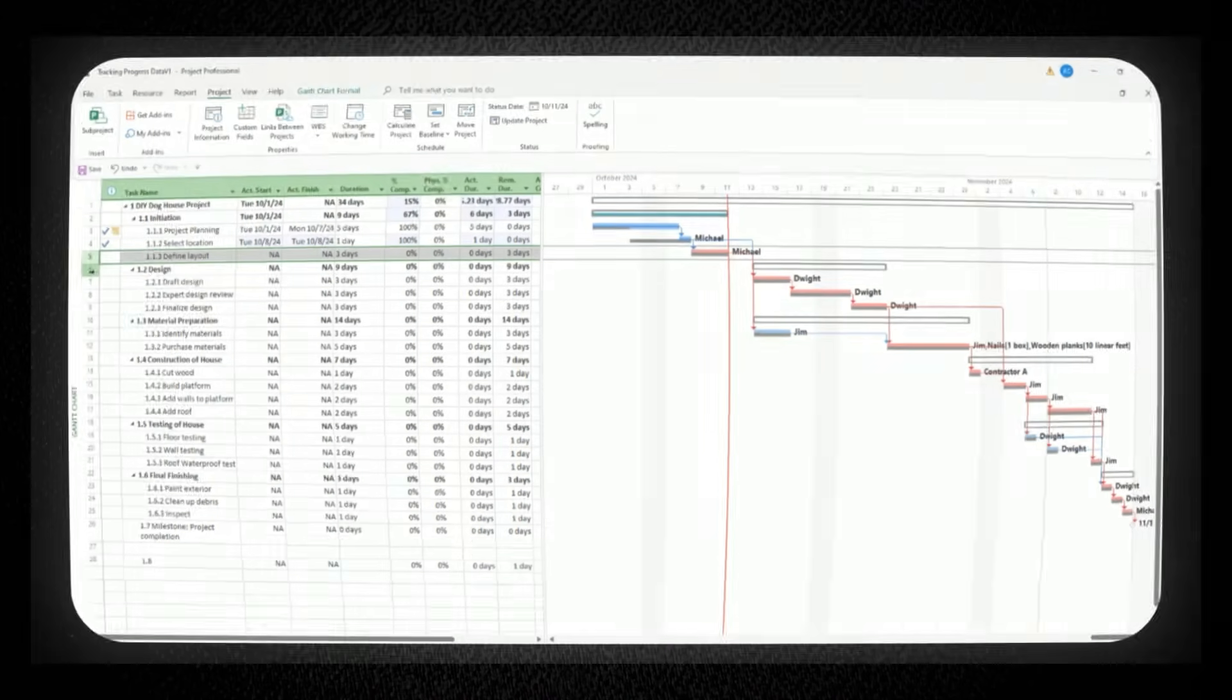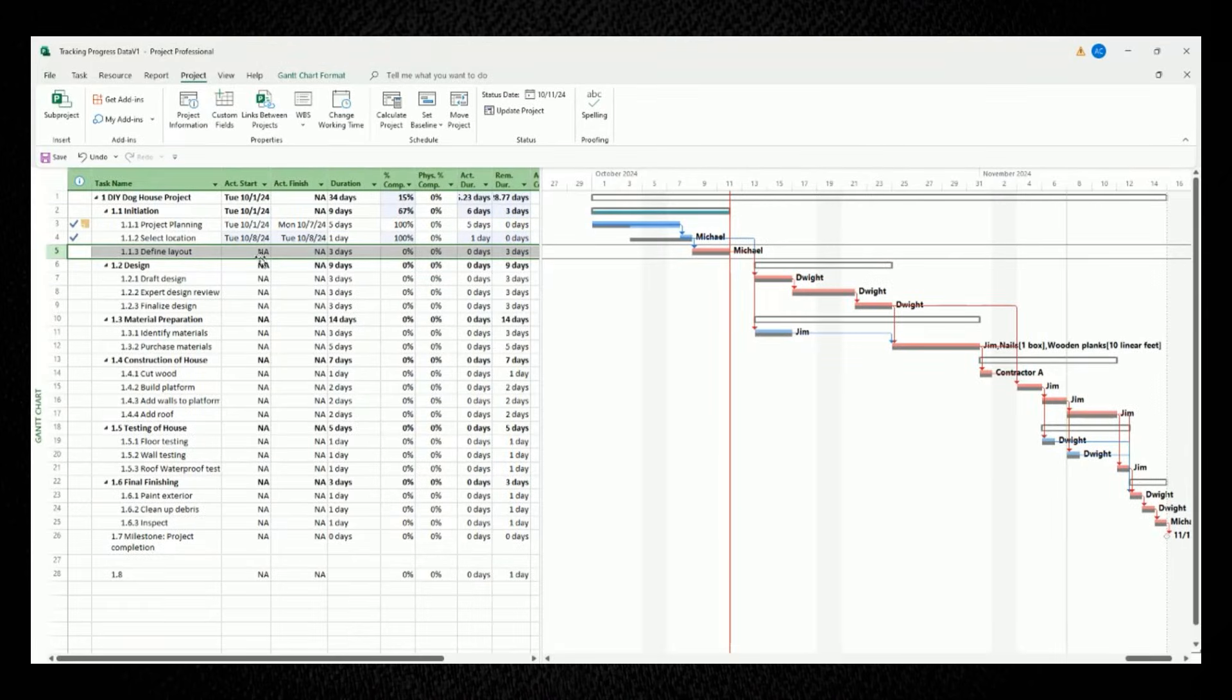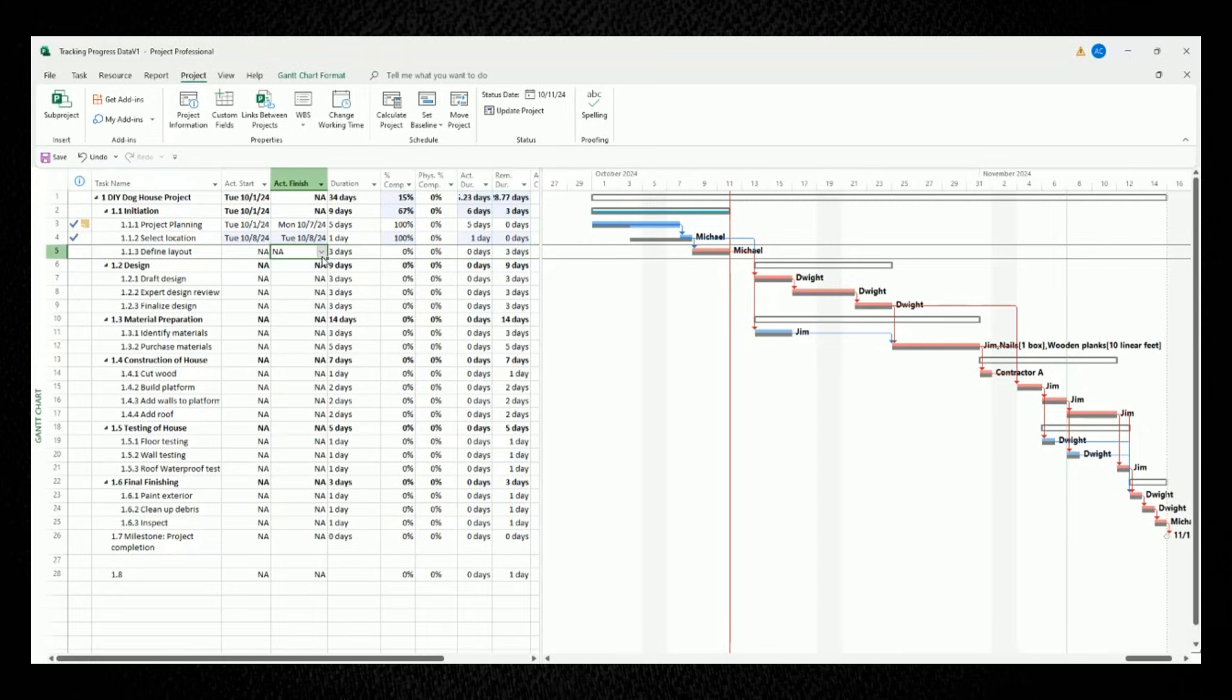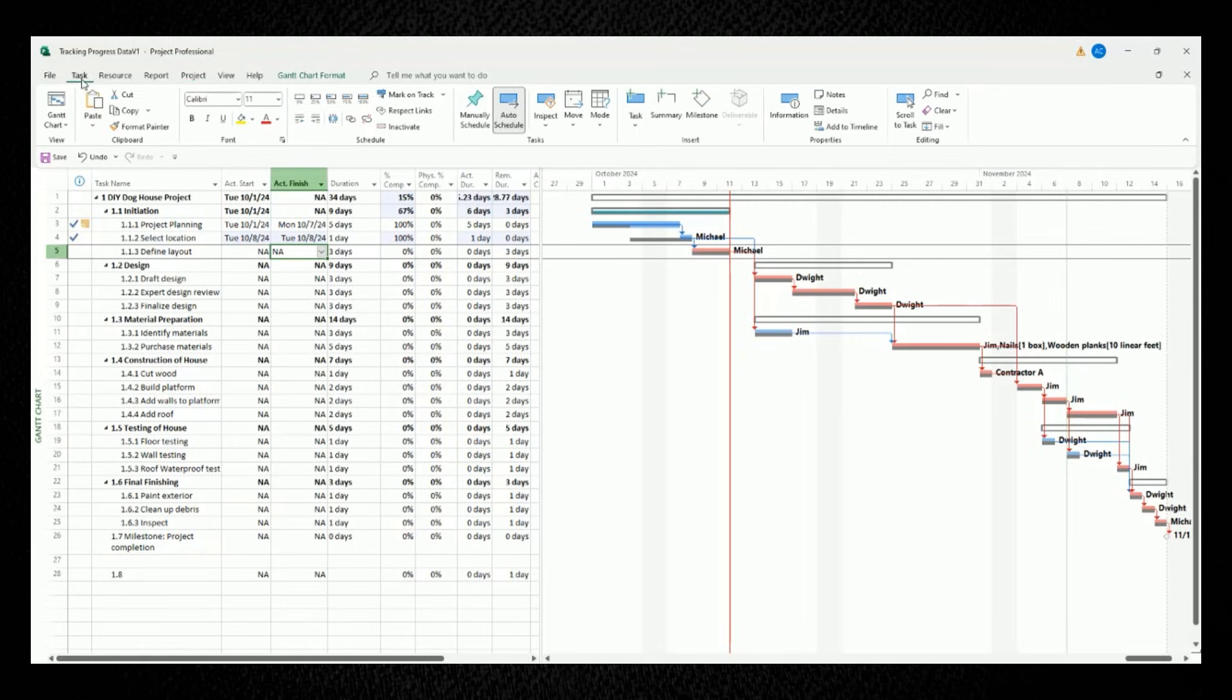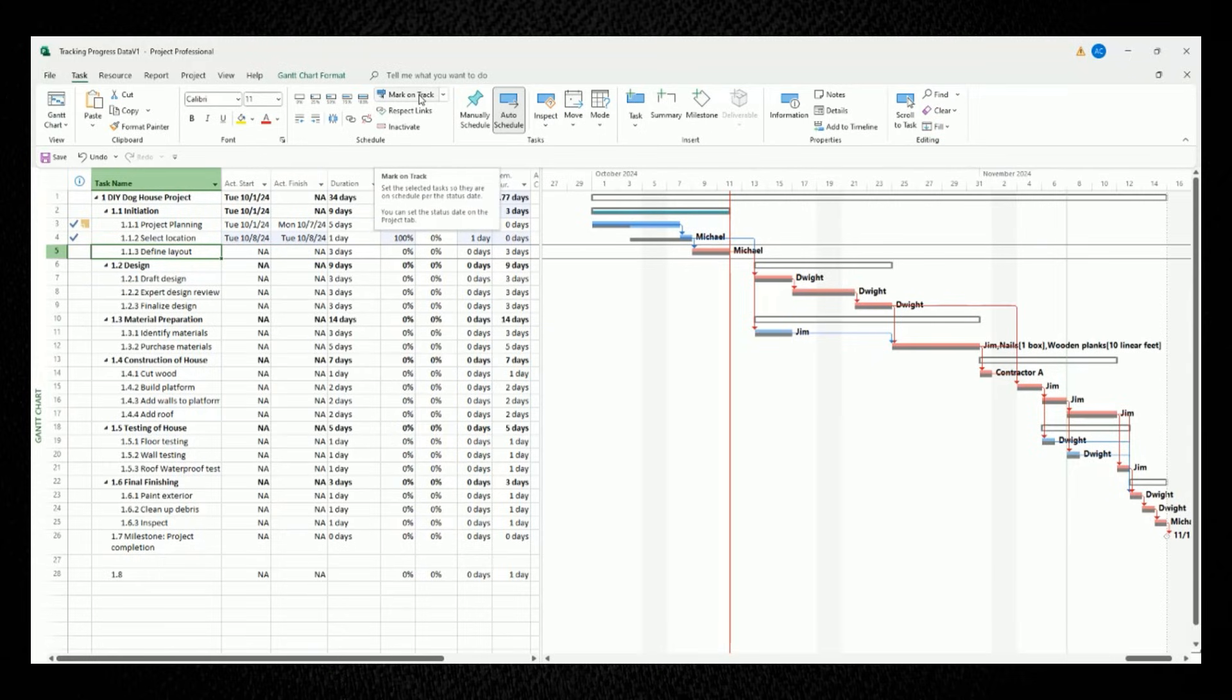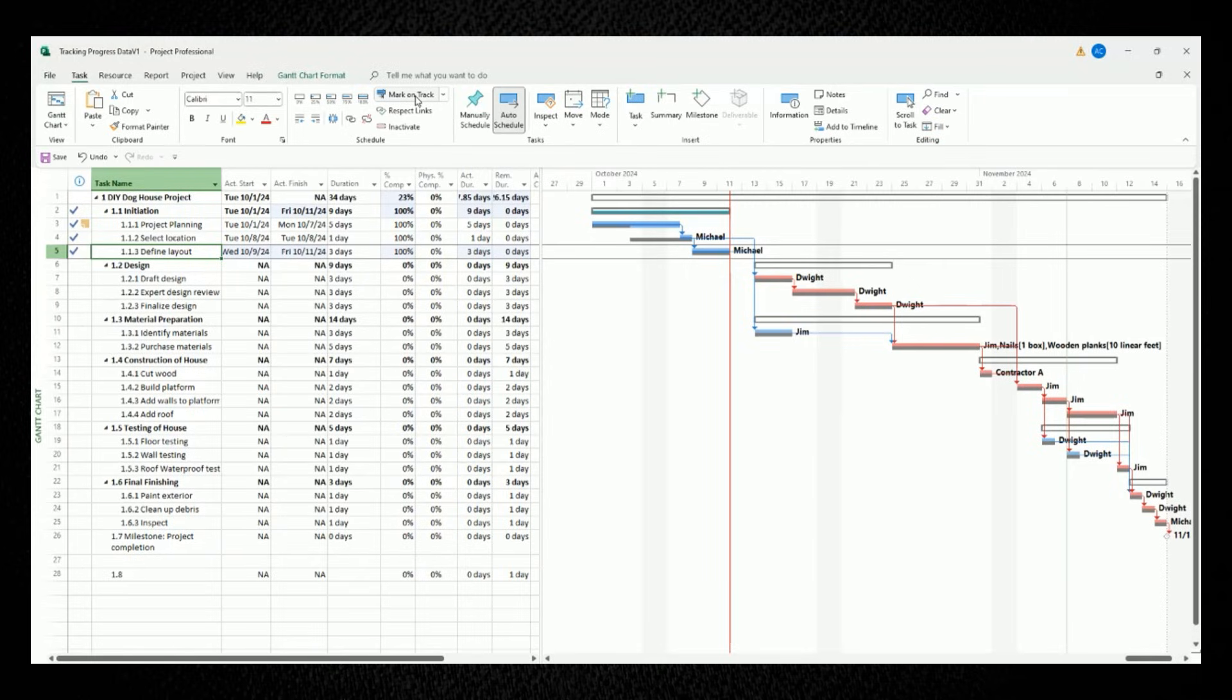So to easily mark it as on track, move your mouse to the top panel and make sure you're on the tab for task. In the section for schedule, there's a button for mark on track. When you select this option, it sets your highlighted task so it's marked as on schedule per your established status date line, which we created earlier in the video. So let's left click the mark on track button and it should now show as 100% completed.